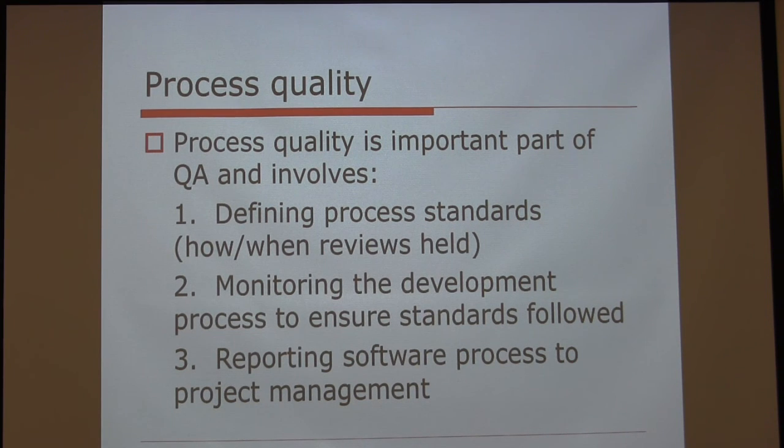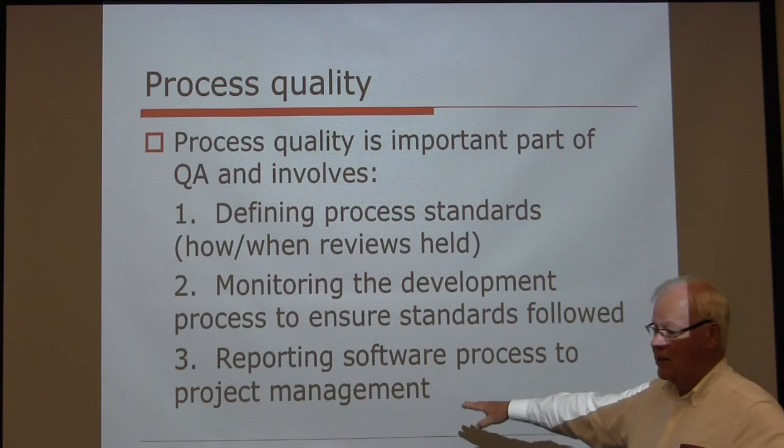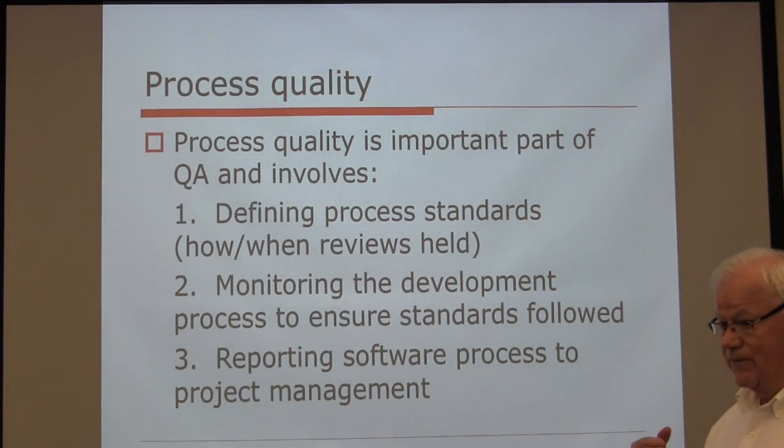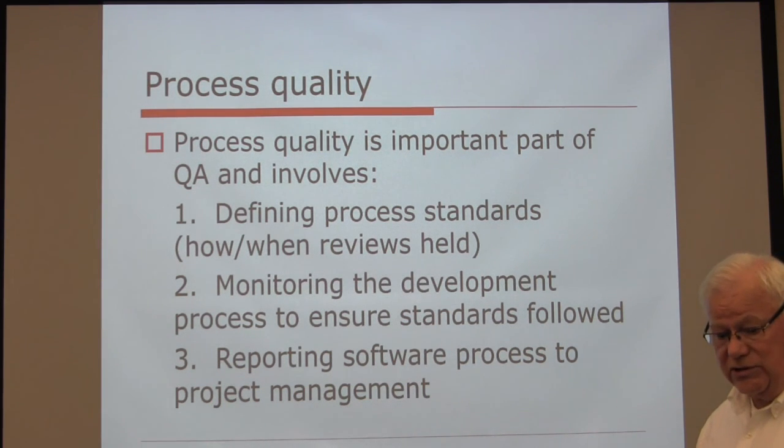So, part of this planning up front is how often and when do we have reviews? Are we going to review weekly during our weekly meetings and talk about not only where we are, but how we are meeting our standards and so forth? It's got to be part of the whole total discussion. And those reports from those meetings need to go back to project management because not always will the software engineer, if he's the manager, he or she, is going to sit in on those meetings. So those meetings must report back.